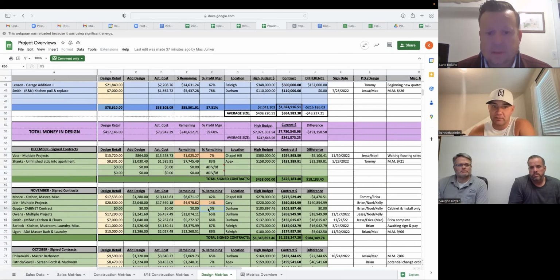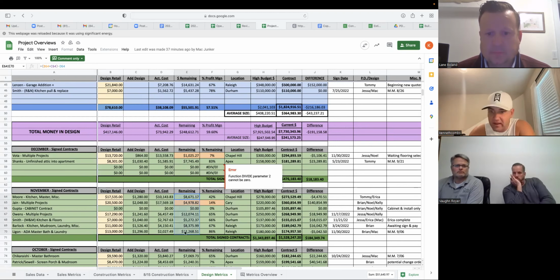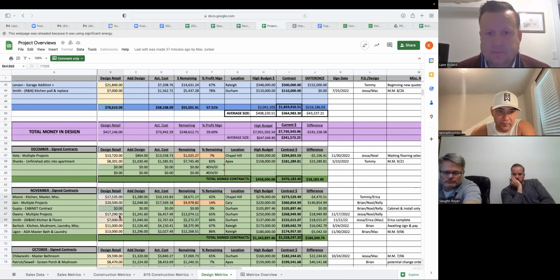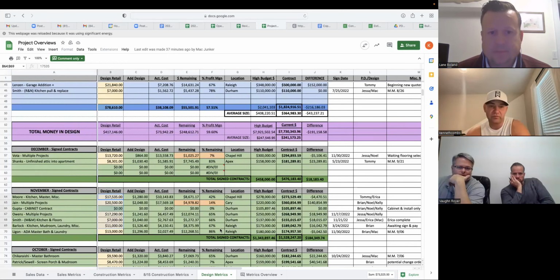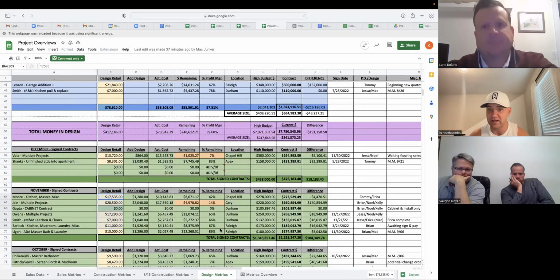Across the board, if you added these up, let's see, that is 51,000 divided into 73,000. So we made 22,000 out of 70. That's about a 30% GP. Something like that. So it's not terrible. At least we made money. And all the jobs got the construction.